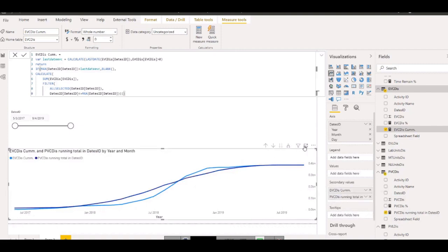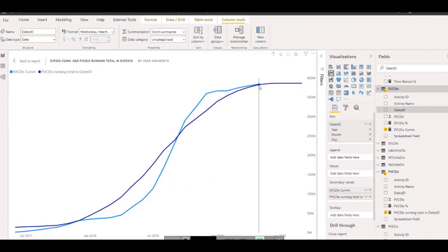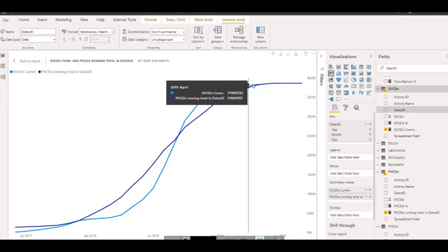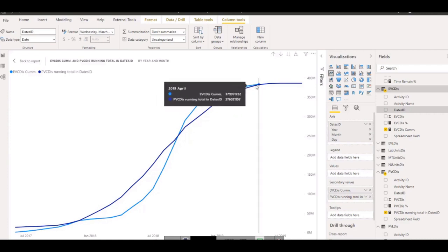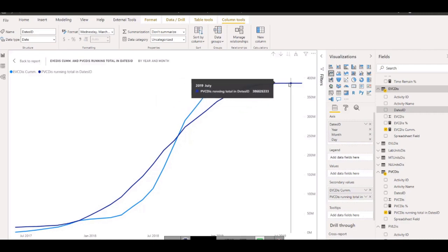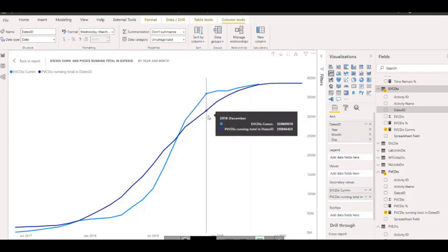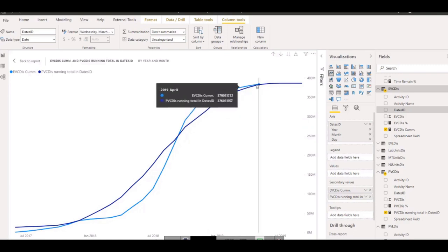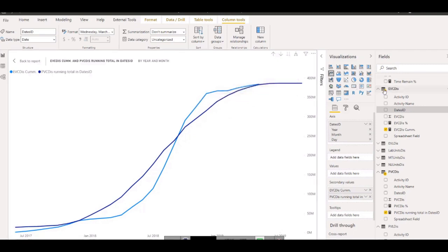you need to see that the earned value will be shown until this point. Okay, because this is the point where earned value has something greater than 0 in each month. In this month some value is present, in this month, because it is adding up. After this point there is no earned value, and this can be the case with you, because if your project is of 2 years and you are standing at the 3rd month, so definitely remaining 21 months you will not have any earned value. You did not do any work so far.